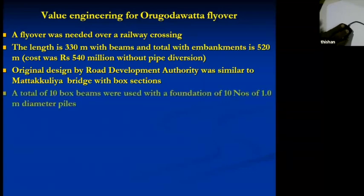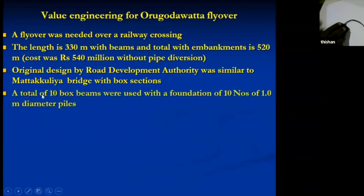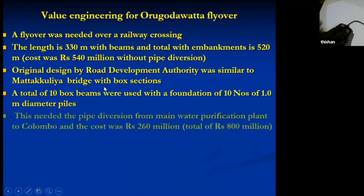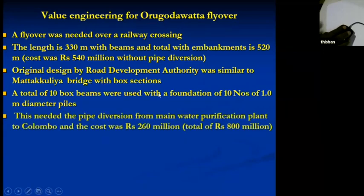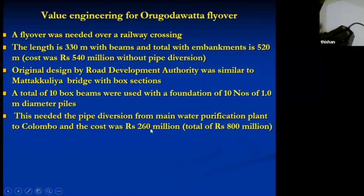The original design had 10 box beams as per the Matakkoliya bridge, and the foundation was 10 piles of 1 meter diameter. This needed pipe diversion costing 260 million. So the total cost of the project was 800 million. Value engineering was initiated by the Chinese contractor.